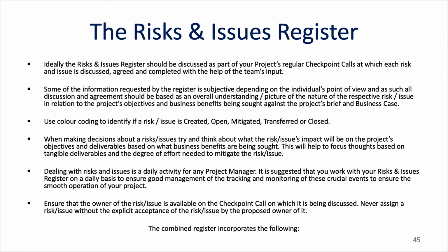Dealing with risks and issues is a day-to-day activity for any project manager. It is suggested that you work with your risks and issues register on a daily basis to ensure good management of the tracking and monitoring of these crucial events to ensure a smooth operation of your project. Ensure that the owner of the risk or issue is available on the checkpoint call on which it is being discussed. Never assign a risk or issue without the explicit acceptance of the risk or issue by the proposed owner of it. So let's have a look at this combined register and what it incorporates.